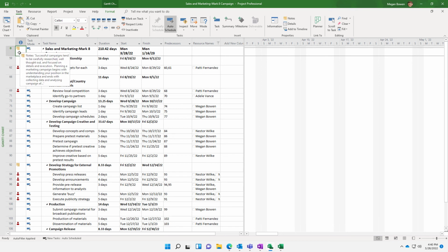One big area of caution that I have to identify for you is that, first of all, your projects need to be highly stabilized. You can't be moving them around or changing dependencies. I've found that I have had synchronization issues when that happens. Second of all, the people working with you in this manner need to be highly trusted and trained, and make them understand that they can't change the structure or it could mess up your file.